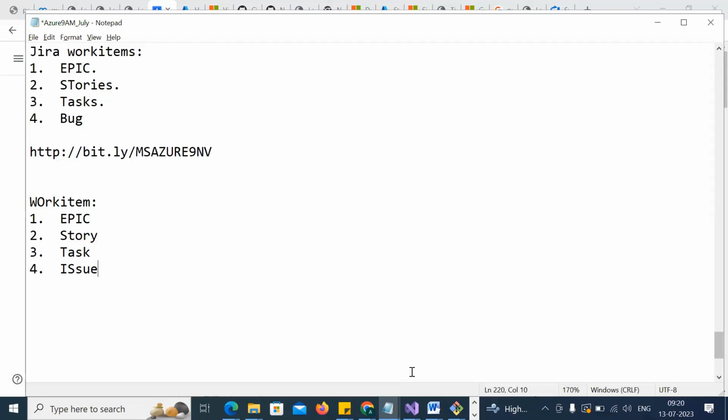Okay, understand. So story, you understand it, right? We have things like username, password, login button, forgot password. These individual things are called a story. Clear? Very good. Now next, if this is the story, let's say I want to check my entire login page of Flipkart completely. If you want to check it completely, it is a collection of similar types of stories. That is called an epic. Epic you can consider as a collection or group of similar stories to check any application. Clear? Now you got it.